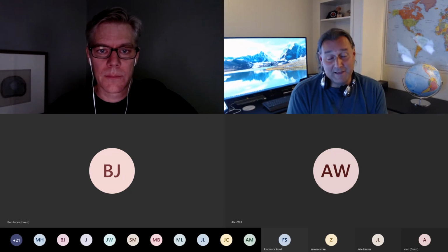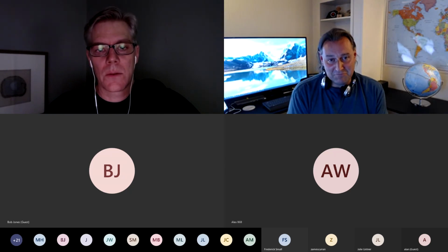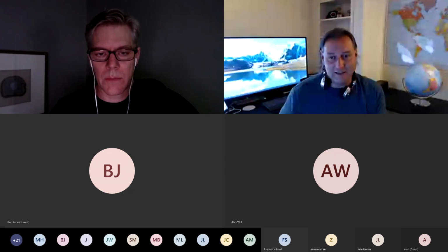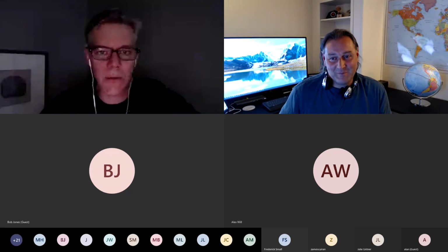And I don't know if you said it directly, but part of that is that bug-free guarantee. You're not really trying to charge more for fixing something or anything like that. Right. I'm sure everyone listening to this would be embarrassed if they had a show-stopping bug in their code. And they would be, unless their boss said, no, you can't fix it for free, we have to bill them for it, or a change order, or blah, blah, blah. You want to fix it. So why not just build that into the price up front and say, hey, once this launches, we'll give you a 12-month bug-free guarantee. If there are any bugs that happen, I'll fix them for free.